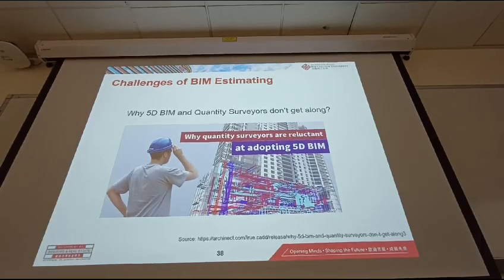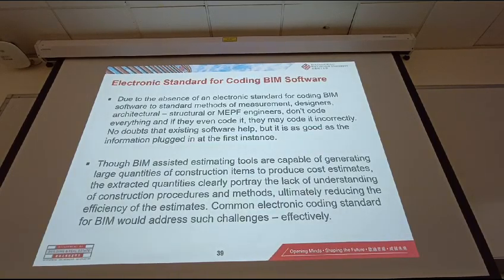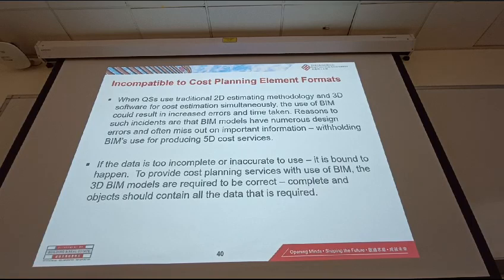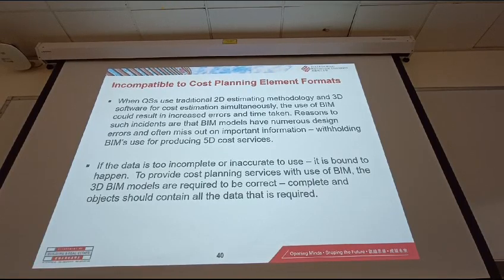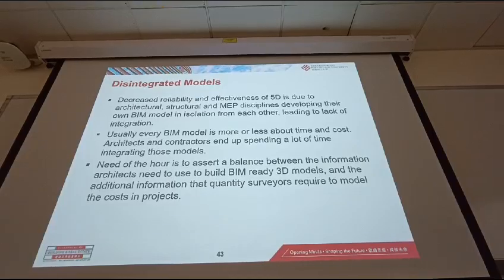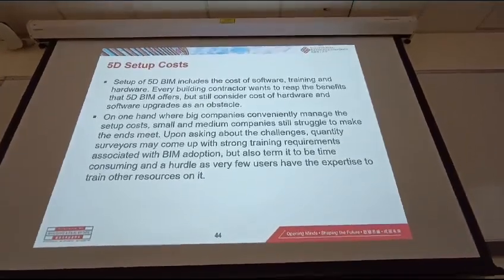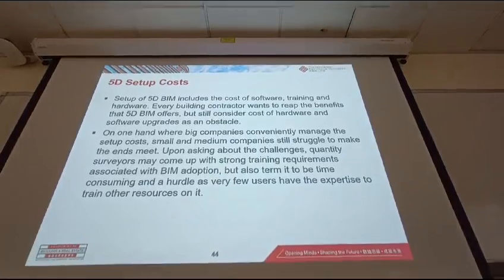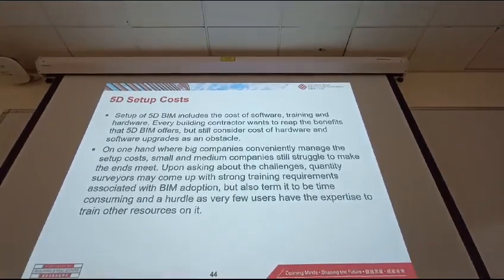They are not relying on the quantities from the BIM for some reasons. The codes, the SMM, are not fully reflected in this BIM software, and some building elements are not comparable, or have some coding issues. So in integrating the model, there are still some issues in using BIM for the quantity takeoff.